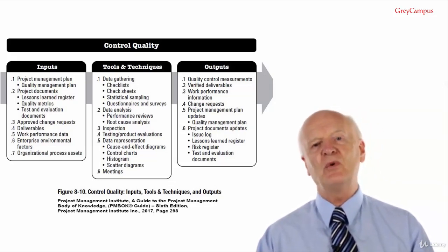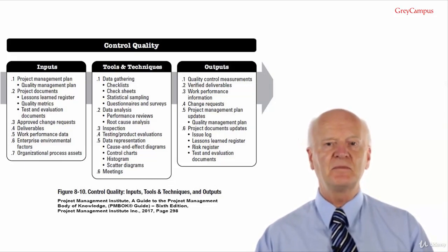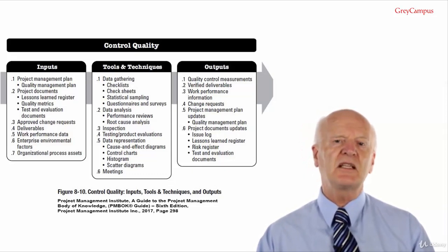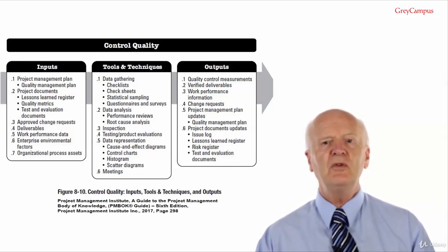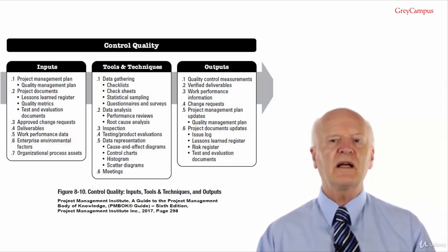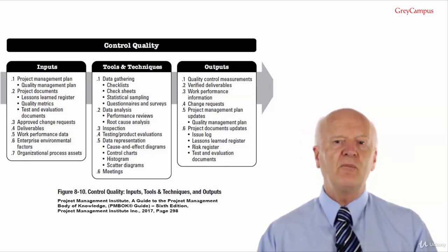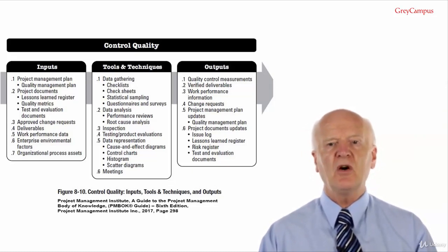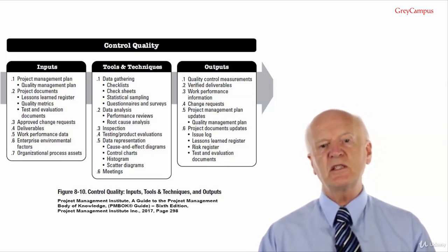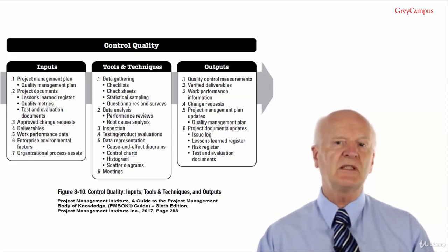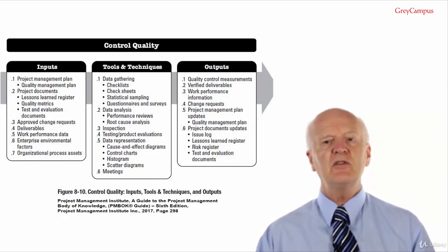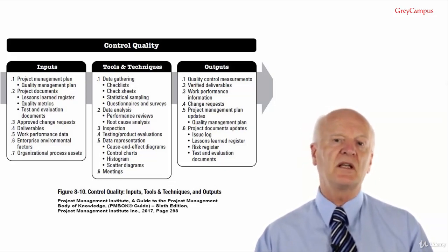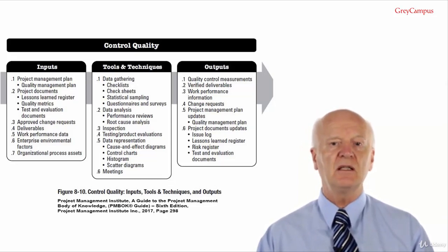Tools and techniques number 4, testing, product evaluations. Testing is where you are physically checking the attributes of a product. Unlike the random sampling in a statistical sampling, this is a step-by-step, organised and scripted procedure based firmly on the project requirements, often carried out by experts or at least people with sufficient knowledge and specific training to reliably perform the test. Think of testing a car. You're sitting in the driver's seat with doors and windows closed. The park brake is engaged. You're holding the ignition key.